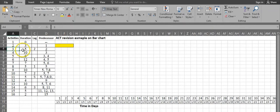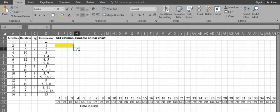Activity 3 has a duration of 5 days plus 2 days lag, and its predecessor is activity 2. So it will start on day 4 once activity 2 is over, and needs 5 days: 1, 2, 3, 4, 5.